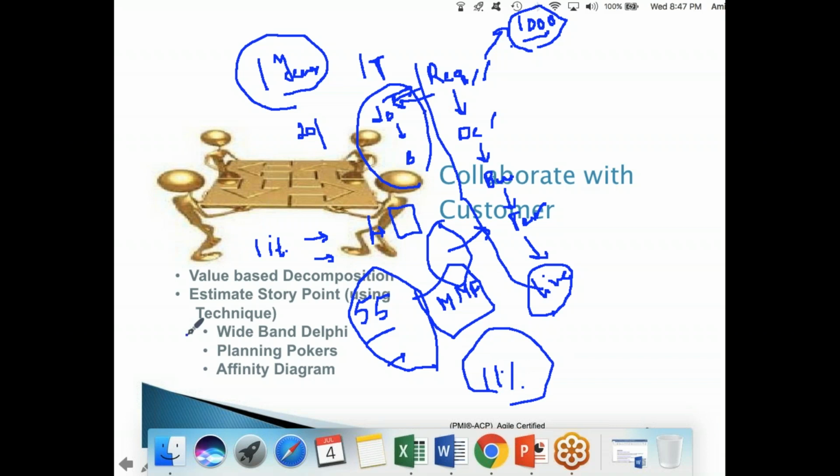So the time to market will be reduced in Agile. What do you mean by time to market? We call it TTM. It is how soon you can go to market with this and start using it. So in the earlier case, if the e-commerce site is done in a traditional project management way, as a customer, you have to wait 1 year to start your business.